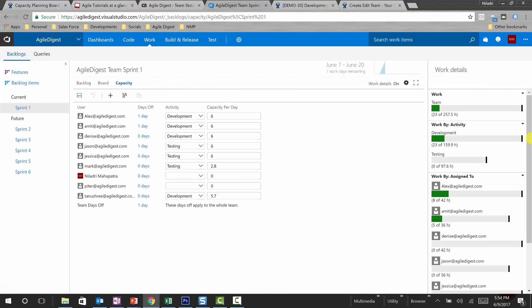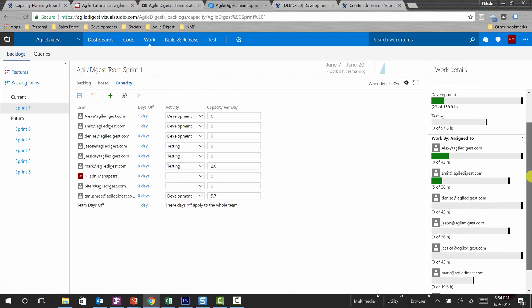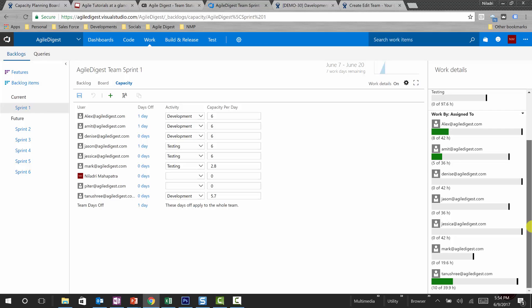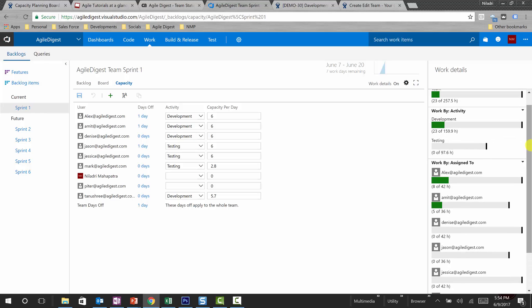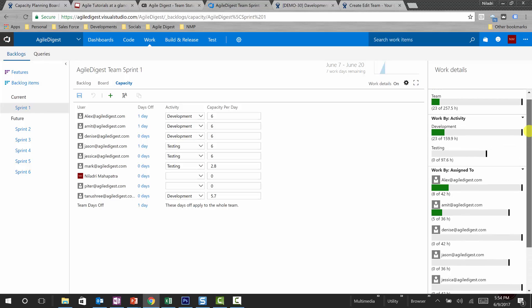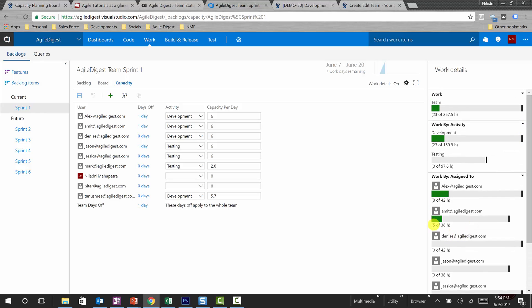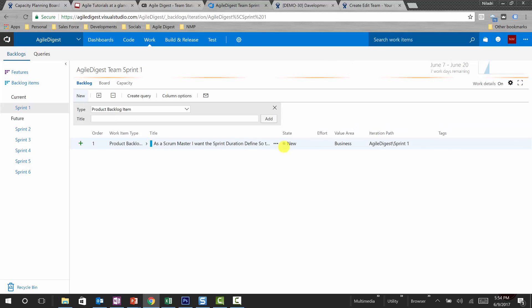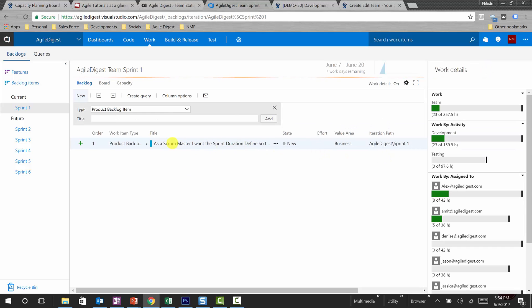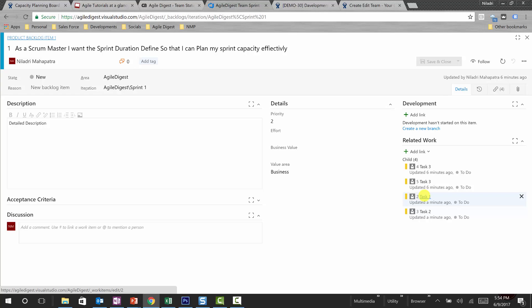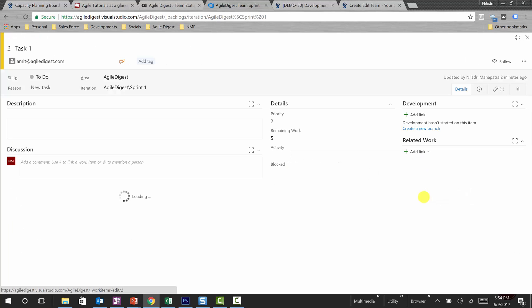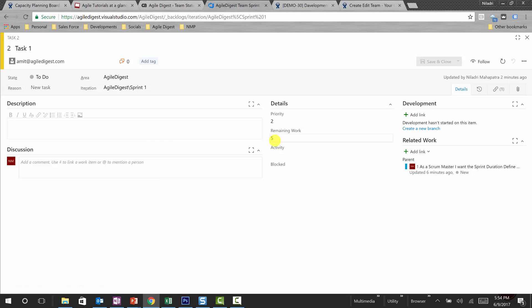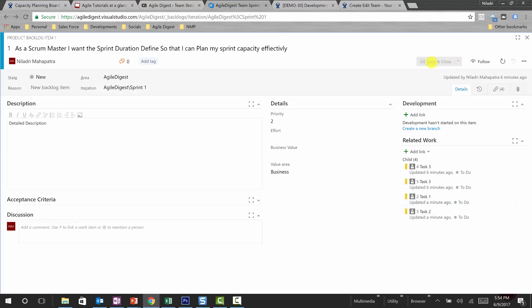So that is how you do capacity planning. If you go into capacity, you can see all these capacities and how those are allocated. For example, if you want to see if someone is over-allocated, let me make these five hours to 40 hours, so you will see it will be turned red. How we will be doing it? We will go to our backlog and open that task that was assigned to Amit.